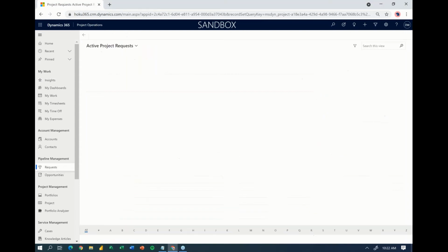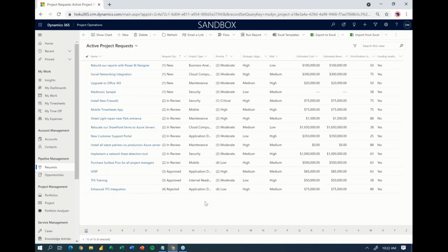One way that projects can come into your organization is through the project request list. So this is especially useful if you're having internal projects going through your system as well, not just customer projects. And sometimes your customers are internal customers, so other departments or groups of your particular company may be requesting things from you that you're then going to in turn manage and work with them on. So you can have a full list of project requests here. You can do some prioritization, capture some basic information, which then can eventually be converted into a proposed project where you're going to then start doing more detailed planning and figure out if and when you can do that.